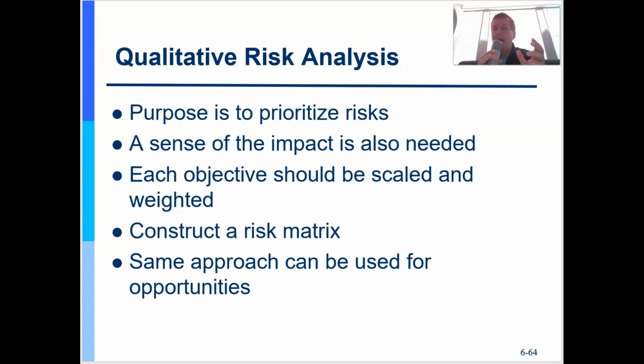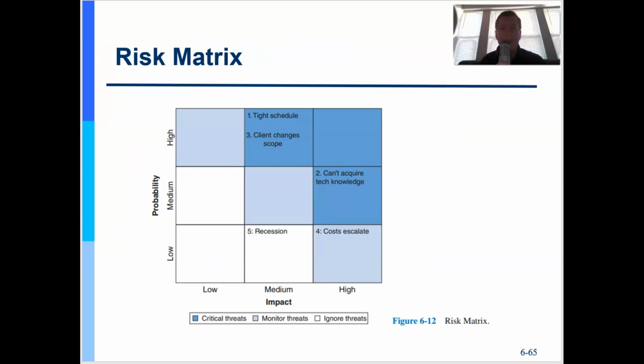And what I'm doing now is using subject matter expertise to quickly rate risks and reprioritize. I take that same risk register, and now I have a priority. See, before I just had a risk register, just a list of risks and categories and maybe risk owners. But now I have that same list reordered in a priority. What is most at risk to me?